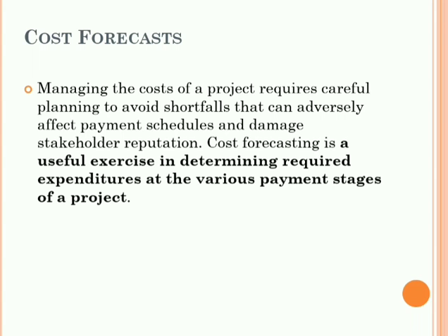Risk can also arise from assumptions in cost forecasts or schedule updates, which, if proven wrong, will increase the total cost and the total time of the project. That is how risk can be created. The contingency here is the dollar amount that is added to the cost forecast to cover for the project risk exposure. The contingency should be commensurate with the risk profile.